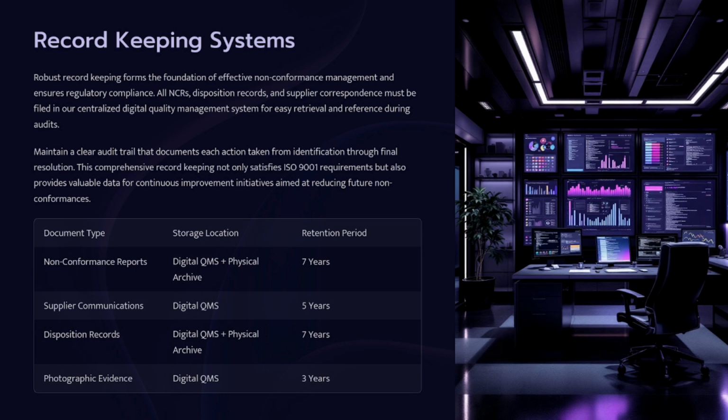Once the issue is identified, in the case of the supplier, then you will send this report to the supplier as an NCR report with a specific time and period to close that NCR, whether it's a replacement or a refund for the amount. That is all about your organization's decision.